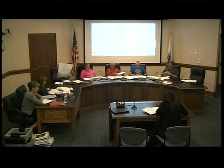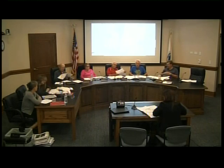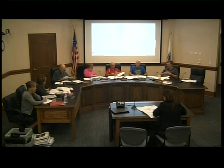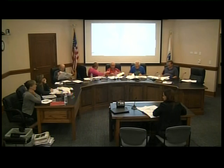So I think you need to protect the swales, and you need to protect the pipe, and do something to say about no tracking of material to the street. And I think those are the things that are different than what the original application would have addressed. They're still under construction on various lots, so they are street sweeping and have the catch basins protected, but I guess they're asking for some erosion control up the sides of the driveway and that sort of thing, and then plating the culvert. Not so much up the driveway, but around the drainage facilities, so nothing gets into them. If stuff's going to run off the sides of the driveway, I think we just want them to line the driveway with erosion control. A wattle type? Yeah. Okay.